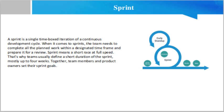The product owner will focus on the product backlog and may also suggest a draft sprint goal, which could be revised through the planning process. The daily scrum is a daily meeting in which team members synchronize their efforts. Each participant will address the following topics: how did your previously planned actions help achieve the sprint goal, what will you do today to accomplish the sprint goal, and is there something that is blocking progress towards the sprint goal.